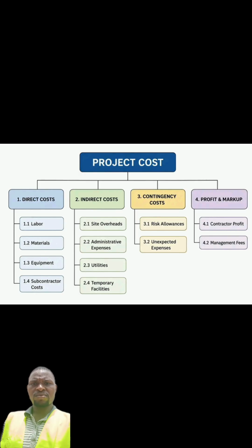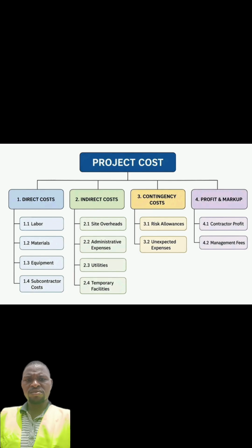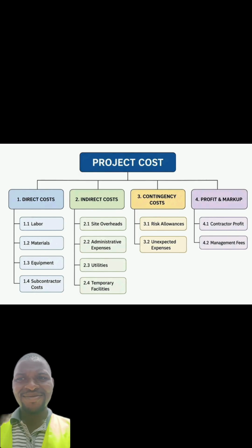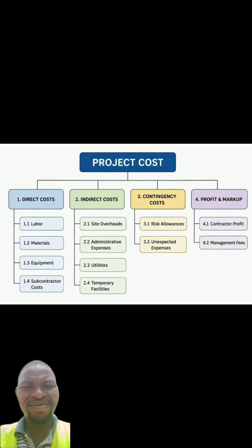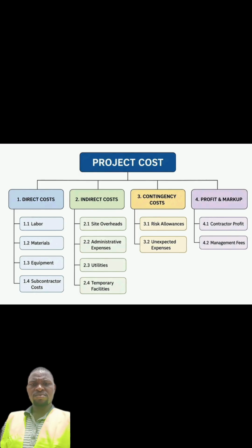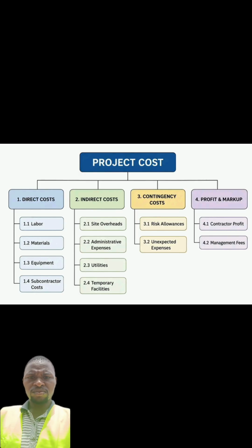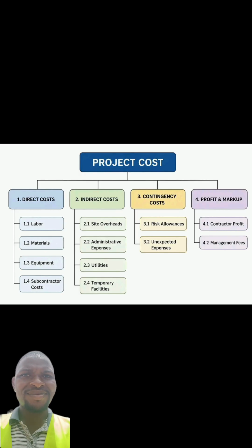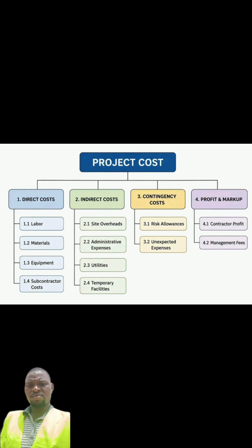Maybe you have to cast maybe 50 bags of cement, so you now have to maybe get about 20 to 30 people to mix the cement, then using buckets to move the cement. Maybe you're trying to cast the slab of the first floor. You start using manual labor to move the cement to the first floor. But if you have your pulley system and you have your concrete mixer, all this can be done with just a couple of 5 to 6, maximum 10 people, right? Depending on the area you're casting, and the job is done efficiently for you.